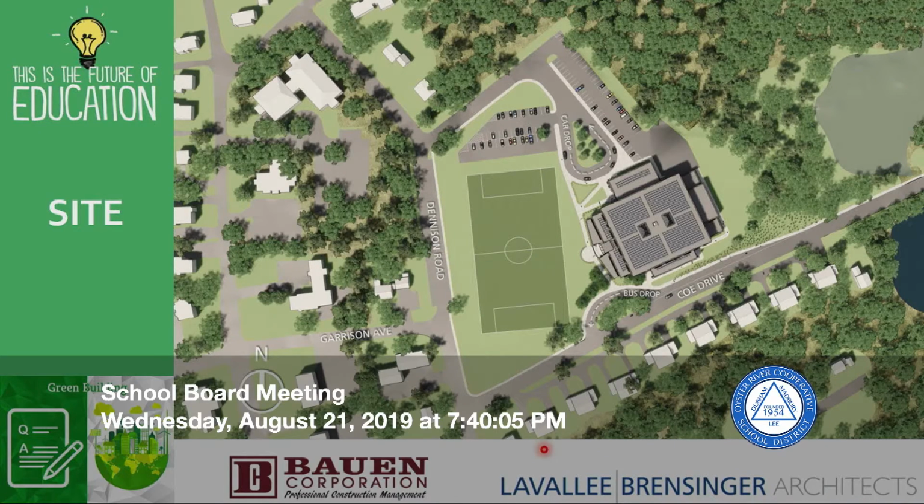Ron, can you go back to the slide on the footprint that shows the roads? I did want to address the issue that Dean brought up, since it was asked. Initially, we were hoping to salvage the current gym, but in order to create a safe and separate roadway for parents, the gym would have sat right where that road is here, and so it would have occupied road frontage and parking lot. The other part of the building I was hoping to salvage initially was the original 1936 section, but the cost of touching that building would have been incredibly expensive because it was never designed for the code requirements of today.